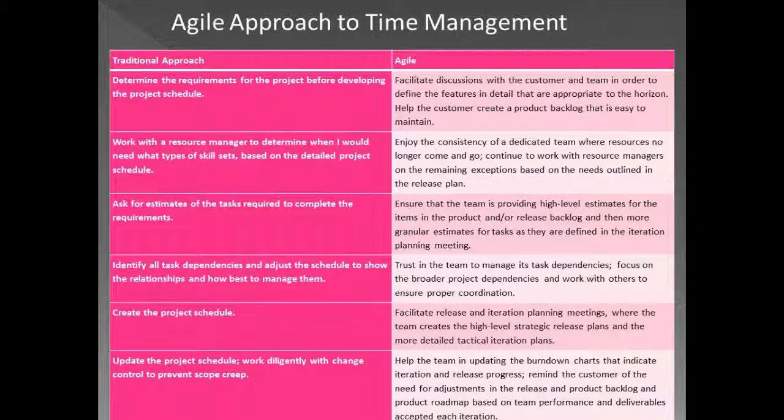And when it comes to activity sequencing, we have what I call dependent tasks, which we need to ensure. In PMBOK, we need to build a network diagram, which means we need a proper sequencing. As far as Agile is concerned, when sprint planning or iteration planning is done, the teams will determine how to handle the tasks and the dependencies.